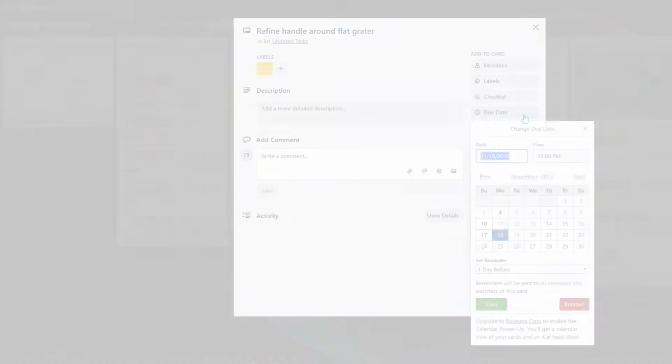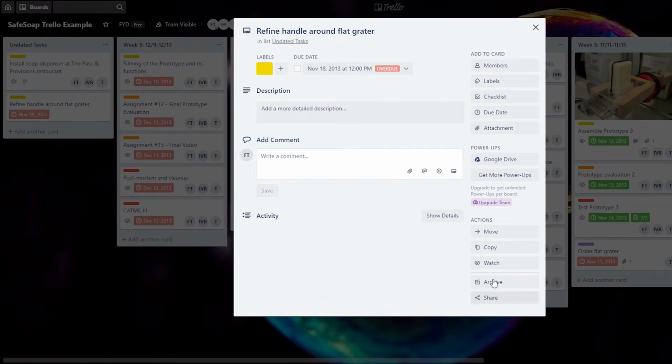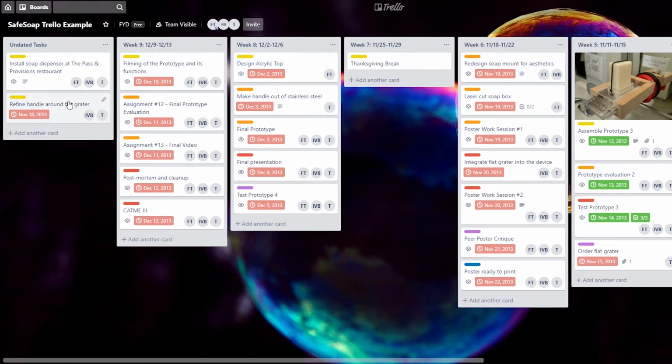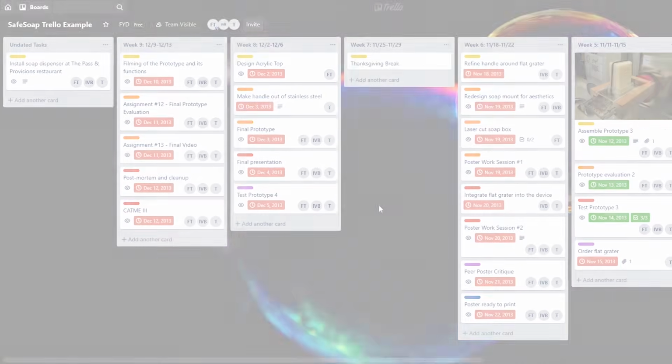Each week, the team tackled the tasks assigned for that week. As they completed tasks, they were marked as such. At the end of each week, they reviewed their progress based on what cards they were able to accomplish each week and decided if the tasks set for future weeks made sense. When the team could identify a solid due date for tasks in the generic column, they assigned that due date and team members to the task and moved the task to the appropriate weekly column. Throughout this process, the team rearranged their cards as necessary to make sure that their project was properly planned and planned as far ahead as possible. This ensured that they could finish their project on time and deliver their product.